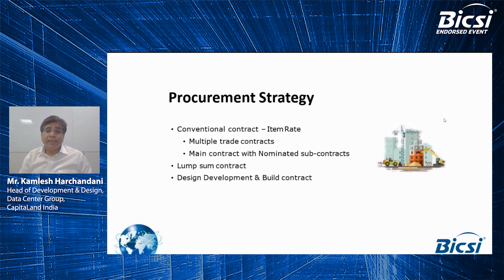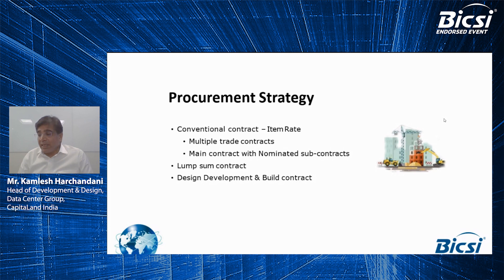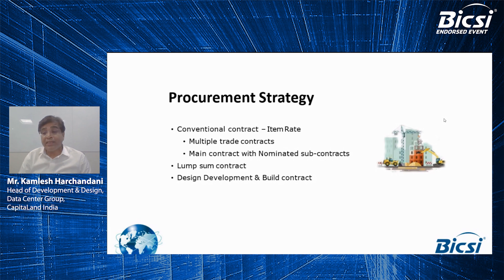Moving on to the next slide, we also follow a procurement strategy. There are three different procurement strategies: first is the conventional contract on an item rate basis; second is a lump sum contract; and third is a design, develop and build contract. In the past, project execution used to take place with separate contracts for core and shell, interior, electrical, HVAC, LV side, and high voltage requirements — which became a tedious task for any organization to manage for seamless integration. It really makes sense to reach out to only one GC for complete project execution, though we still need to see more experienced GCs in the data center segment.